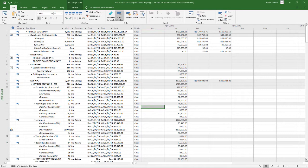Sometimes you've got a supplier who has special pricing or different prices that apply in different time frames. Or the most important reason is that once you do a tender estimate with your MS Project, you will obviously use the cost of your resources, but you don't always want to show this cost to your employer or to the other parties in the project.